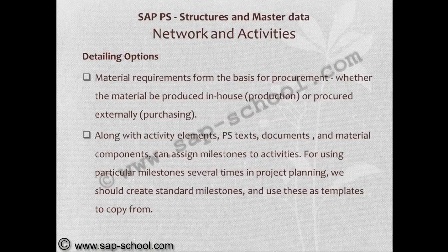Material requirements form the basis for procurement, whether the material is procured in-house or procured externally. That means the production or purchasing. Along with activity elements, PS text, documents and material components, we can assign milestones to activities. For using particular milestones several times in project planning, we should create standard milestones and use these as templates to copy from.